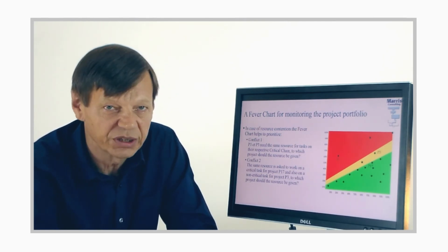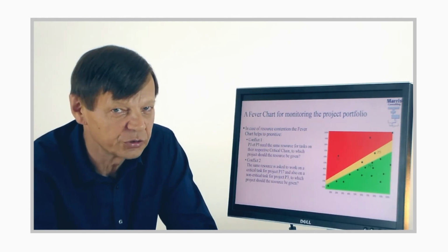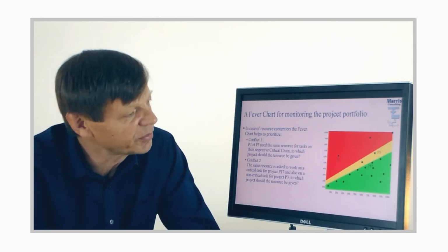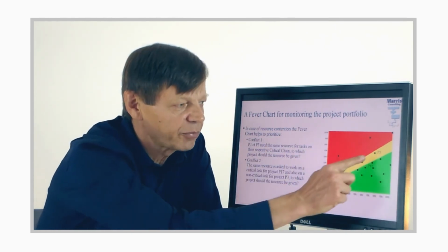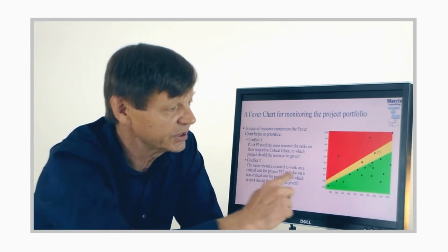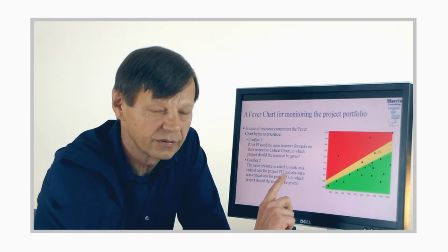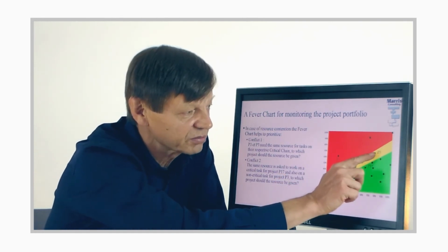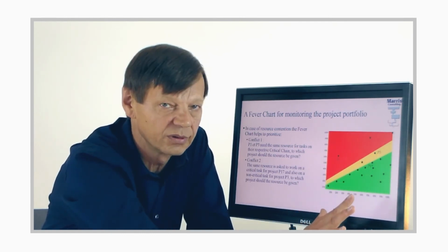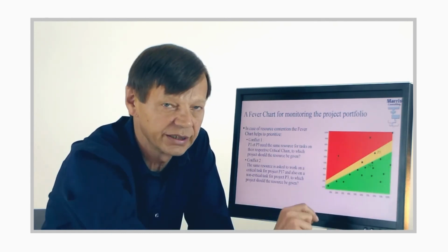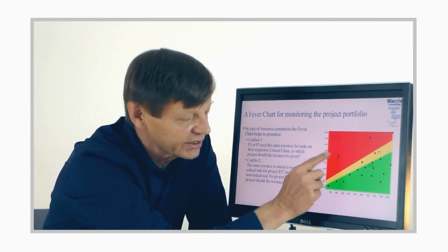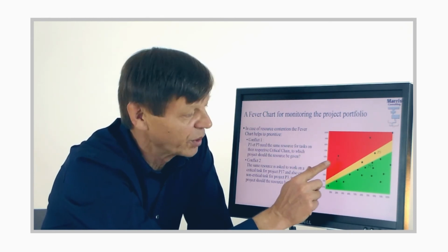And that's remarkable because I think most companies that are not using things like critical chain will probably get Susan to work on that one. Why? Because among other things, all their projects are late. So that project is actually late. It's nearly finished, so they want it out the door. Okay? In this environment, everything is on time, right? So if it carries on like that, it's just going to finish a little early. It's not a big problem. P3 is going to finish a little early. Okay? So it's perfectly reasonable for Susan to come and work here, because that is a really worrying one. That's a project that had a problem at birth.